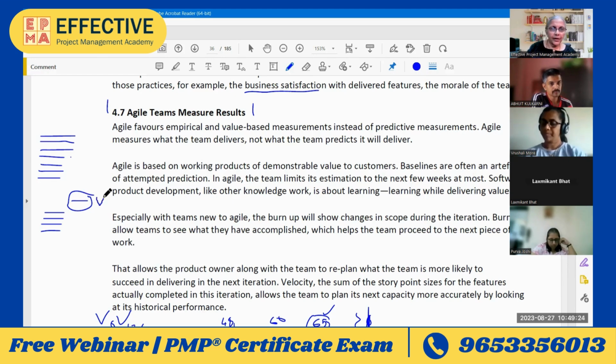The story that they are able to finish in one day's time is technically called a single story point. Ideally, this is how a story point is calculated. I know most Scrum organizations will say 1 hour is one story point. That's not the correct way of doing it.